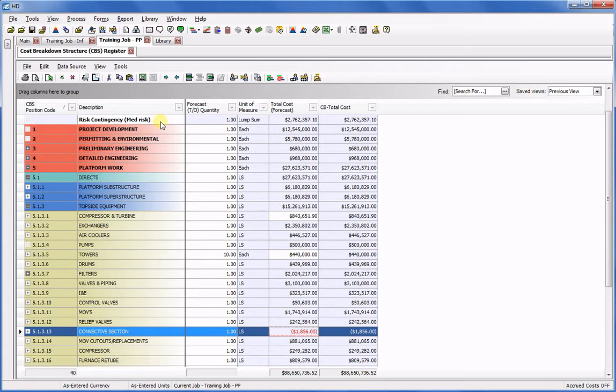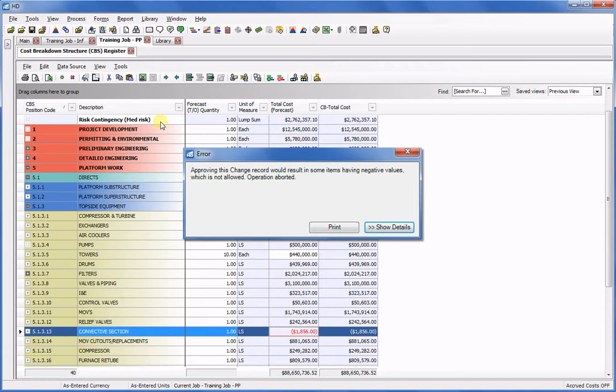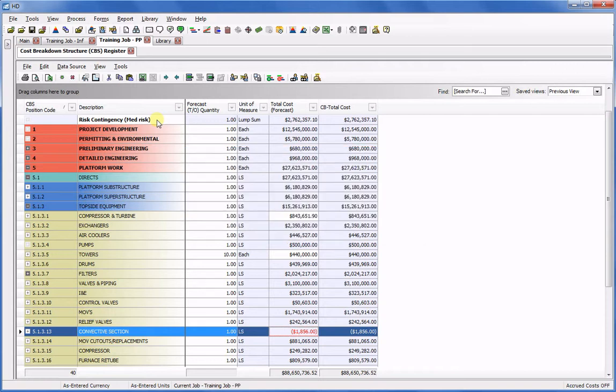Previously, I wouldn't be able to move money from a negative item in HD and would receive an error message when attempting to approve the move. But with version 13, I can now make the change.